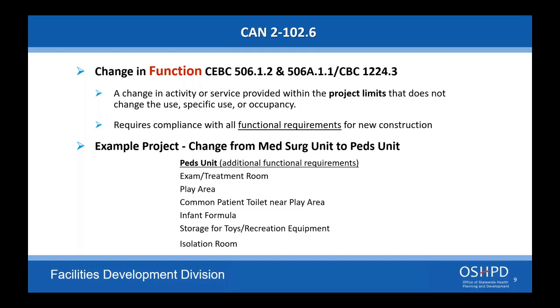Again, for an emergency type project, you may be able to do some of the work prior, but only with the RCO's permission to do so. And it will need to be fully compliant once it is completed. So you want to make sure you know what's expected and that it's engineered correctly when you're installing it.